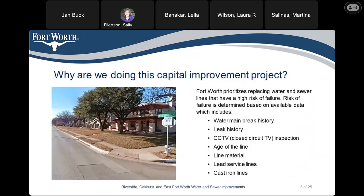Why are we doing this capital improvement project? Fort Worth prioritizes replacing water and sewer lines that have a high risk of failure. The risk of failure is determined based on available data, which includes the water main break history, leak history, closed circuit TV inspection, the age of the line, the material the line is made of, lead service lines, and cast iron lines.